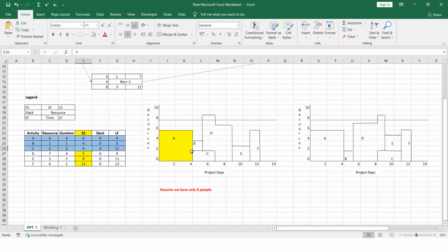That's why I began with the C activity. It is not indicating the order of beginning the activities. In the initial loading chart, you are required to start all these activities at the early start time. As the C has a longer duration compared to the B, I have taken the C activity first. After drawing the C activity, I will take the B activity.